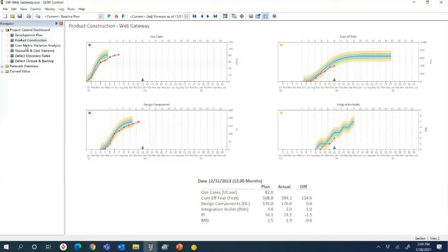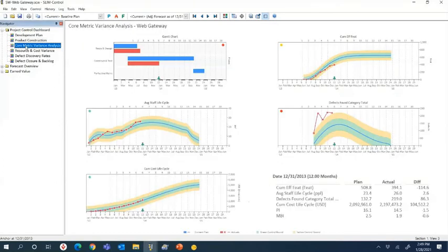And we can look at some additional measures, some dashboards. You can see here the schedule and again the scope, and now we've got staffing and cost and defects on the same view here. And you can see this project's in trouble, not only from a schedule or construction viewpoint, but also we're finding a lot more defects than we had planned. Now the question is, what are we going to do about it? So the first thing we're going to do is run another estimate to validate, to confirm and make sure. We're going to run another estimate to see where we're actually going to be going forward.